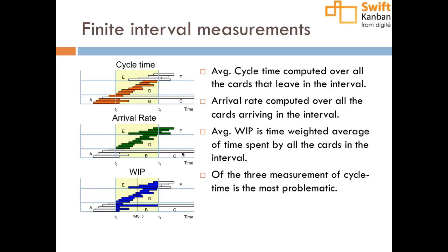And that's what tends to make the cycle time go up and down, as in the chart that Mahesh was showing earlier. That's just because it happens to have some cards that took a long time to finish. It's not necessarily that your process suddenly got bad.